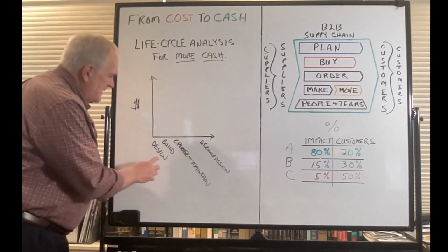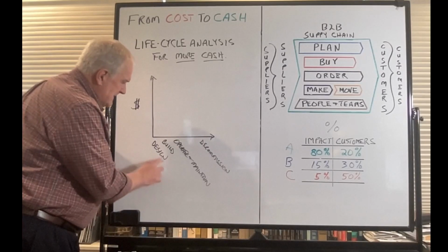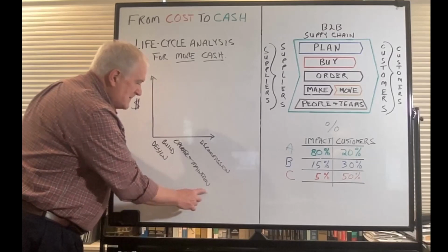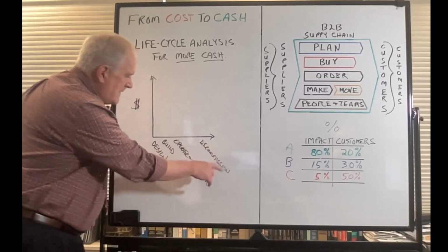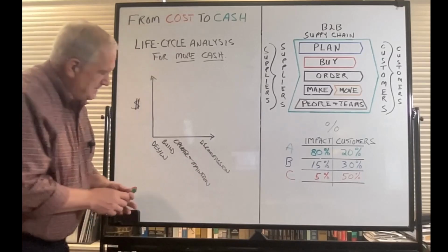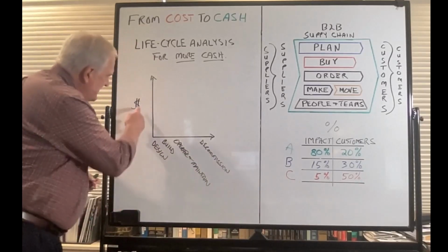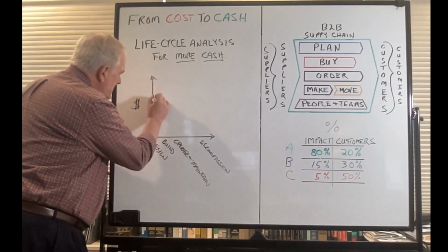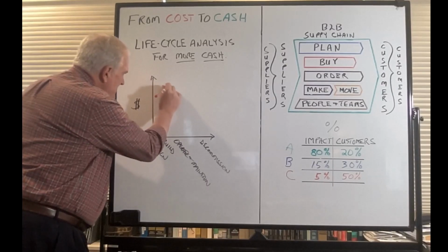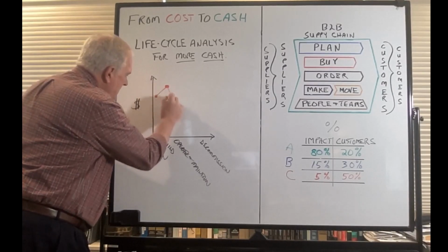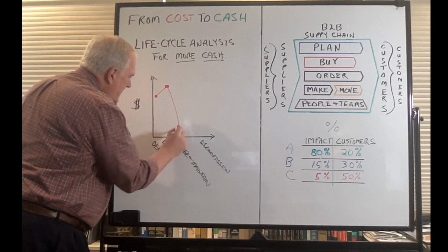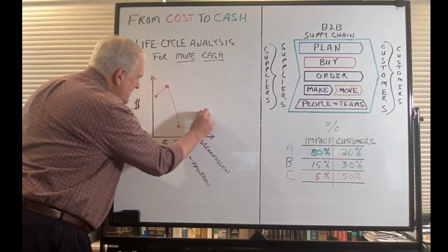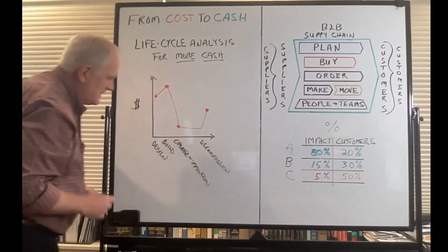Typically, facilities and equipment go through these phases. They start with design and then build, then operate and maintain for as long as possible, and at the end of the life cycle, a decommissioning phase there. And typically, when we're looking at the dollars invested, it's very high in the design and particularly in the build phase, and then the operate and maintain investment tends to be less and for as long as possible, and then it jumps up again a little bit to the decommission phase here.